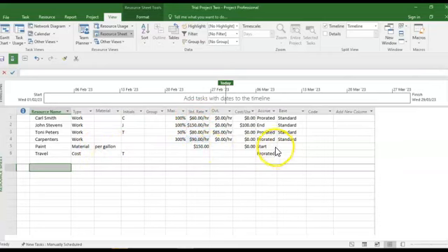And you pay it at the start before you leave the shop. Travel. Travel is cost. You do not have a rate because what you may have is a budget for travel. And as people travel, then you enter the cost of those particular trips in your cost estimate.